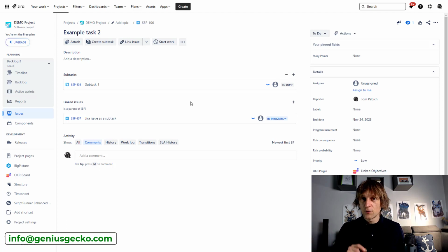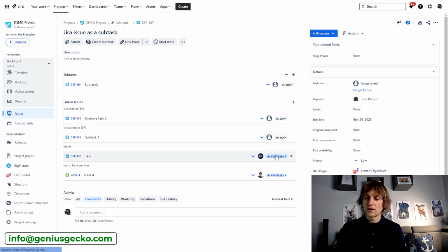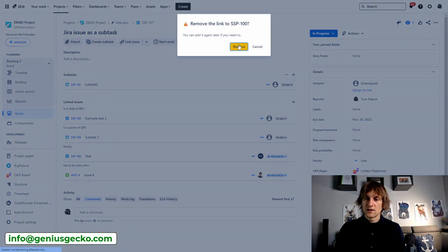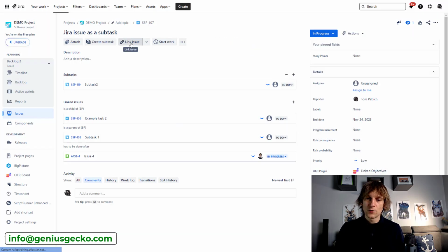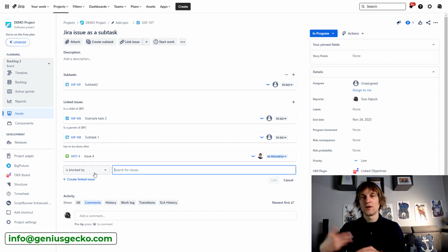With links, it's unfortunately not possible, and you have to manually delete the links over here on link issue, right? So which essentially deletes the link and gets rid of the old links and creates new ones, right? So I can click this and the link will be removed, and then I have to go to link issues and recreate the links with a new type. So that's a pain in the butt, unfortunately, but it is what it is. There are some a little bit advanced ways around this, still not super comfortable and usable only if you actually are working with large volumes of data.